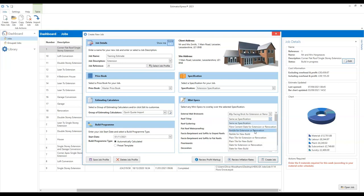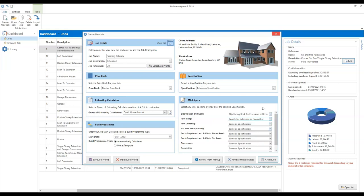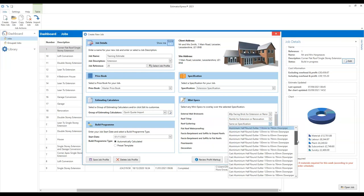Let's select the pan tile option. You'll see there's one for extension or renovation and one for new build. The difference between those two options is the labour time it will allow, so make sure you select the extension or renovation option. That will take into account the fact that your roofing is going to take perhaps a little bit longer — maybe 20% longer for extension work, because you're working on smaller areas. So it's a case of working through any of the relevant mini specs and selecting the materials that you're going to use. For guttering, we've got a whole raft of different guttering systems.